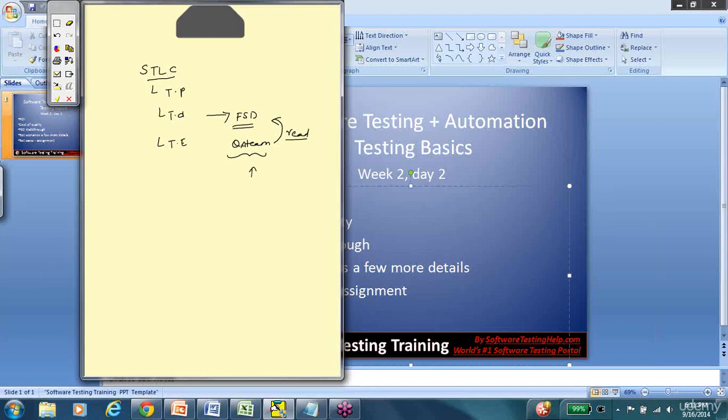But my question is, why are we starting with step 2? Why aren't we starting with test plan? The reason is that at this point, without requirements, the kind of information that the test lead, or QA lead, would incorporate into the test plan would be schedules, team size, so pretty much high level basic information. Scope also is not exactly clear at this point because you really don't know the extent of functionality of the software unless you go through the FSD review completely.